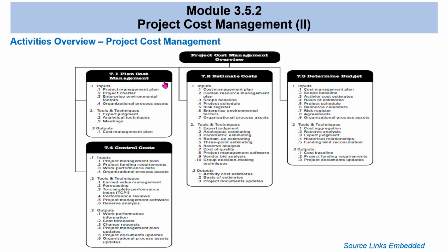So if you choose to do plan cost management, one of the inputs would be the project management plan and the charter, to see what has been agreed on. Then you can use expert judgment, analytical techniques, and meetings as tools and techniques to eventually come up with a cost management plan, which will be the output.